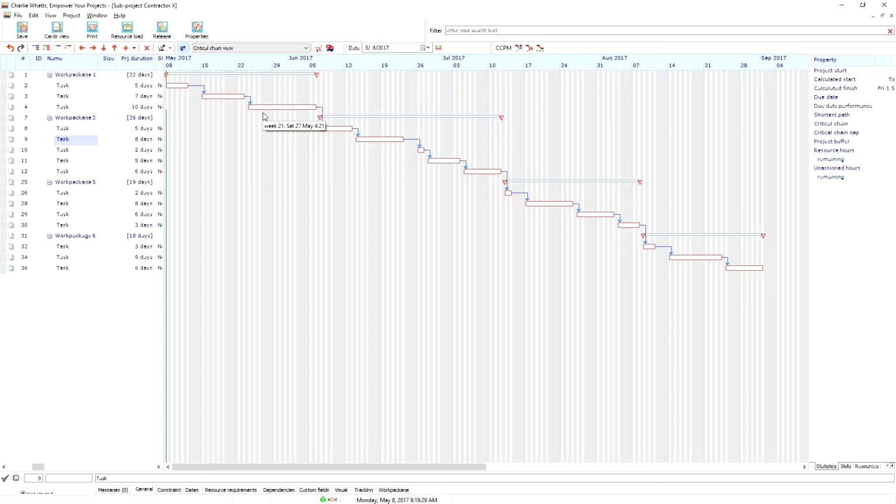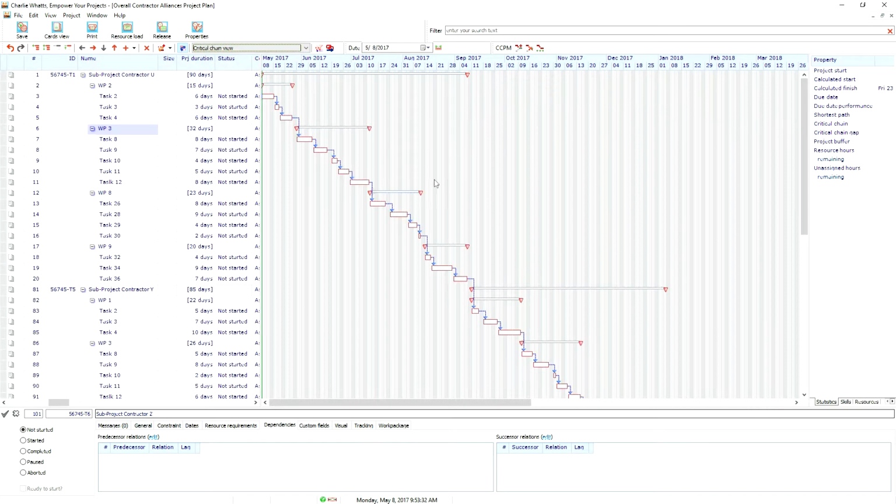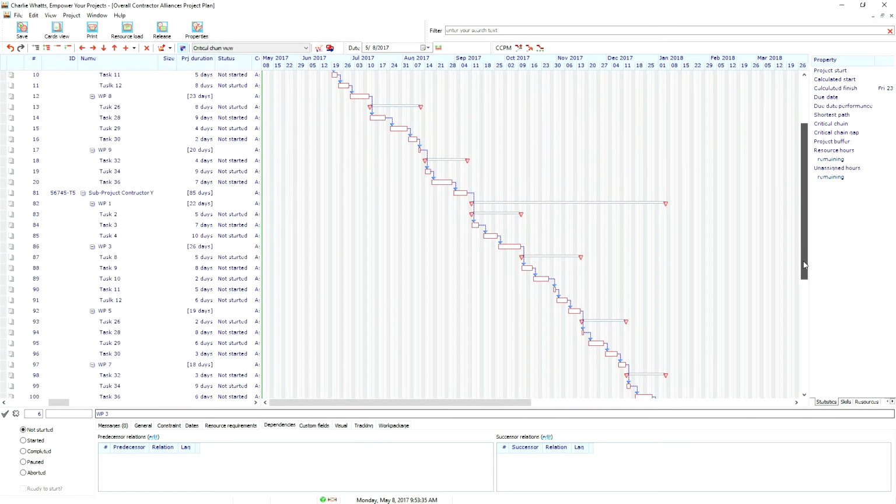Just ask for the critical chain. It provides you with an easy quality check on their project plan. And you just need their critical chain, not their problems. And you don't need to worry that you need to copy hundreds of tasks manually. Normally critical chains are small and just consist of a few of the total number of tasks. Just do it manually. It is easy. And this is the integrated planning already. All projects are in. And this is our critical chain.